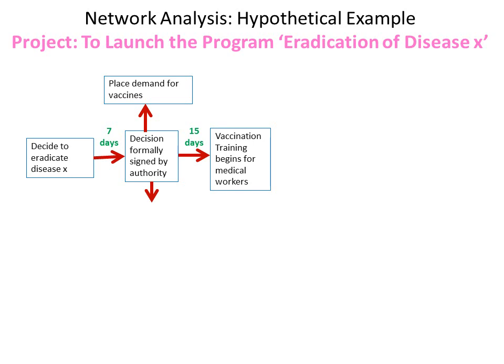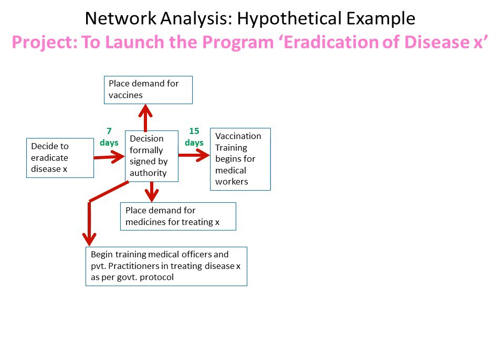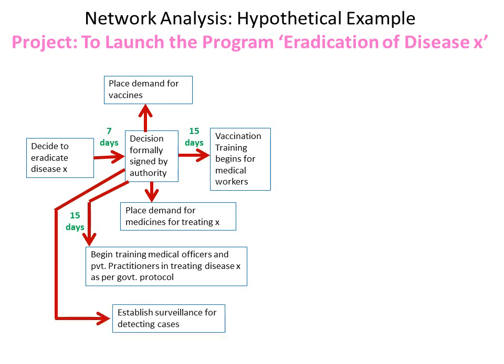And simultaneously, the demand can be sent for the medicines for treating the disease. Also, simultaneously, efforts can be launched to begin the training of medical officers and private practitioners within the area for treating the disease X as per the government protocol. Beginning of this training will take 15 days approximately. Also, simultaneously, efforts are started to establish surveillance for detecting the cases which will be treated by these trained doctors subsequently, and 1 month is required to establish the surveillance system.